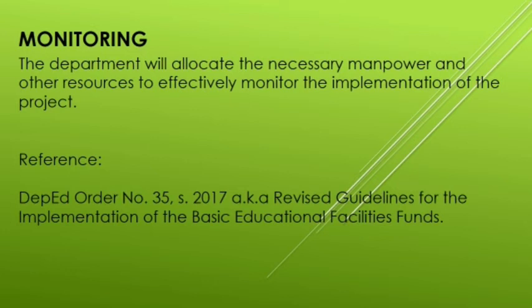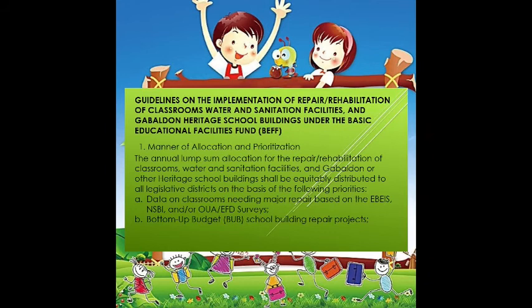So in construction of the building, along the process, there will be monitoring. So the department will allocate the necessary manpower and other resources to effectively monitor the implementation of the project. That manpower might come from the DepEd personnel. It could be the school head with the help also of the barangay officials or the BLGU. So we are done with the fund for construction of school buildings.